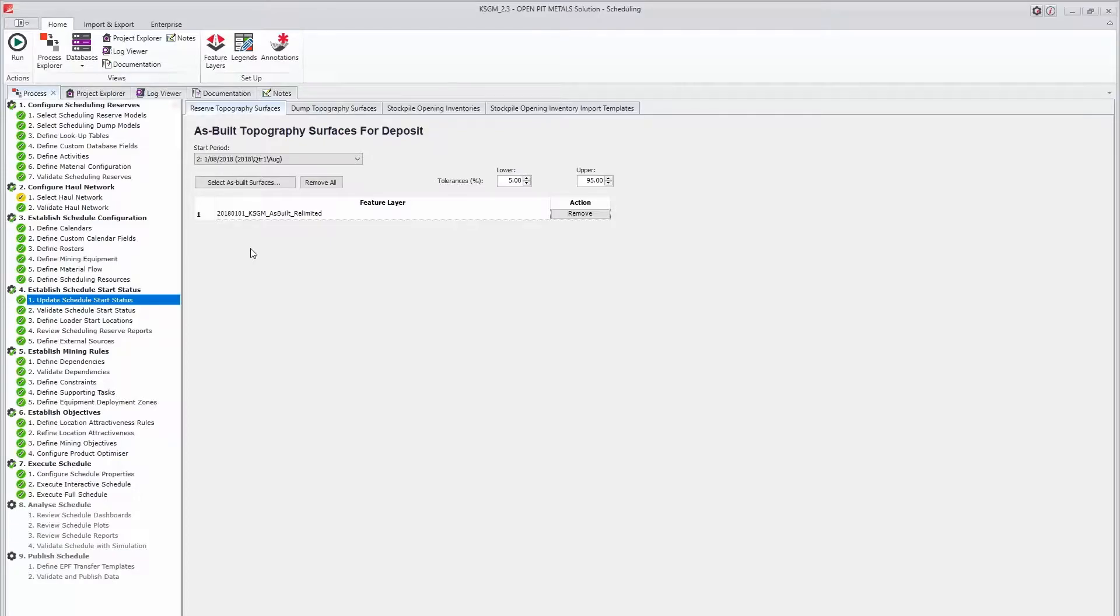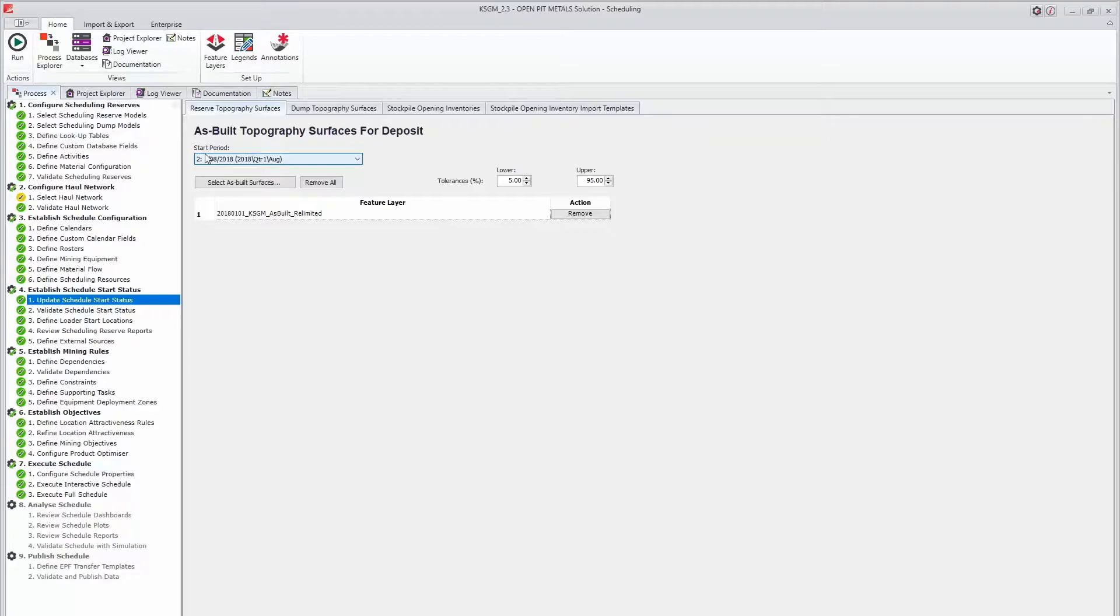To do this, we will use the Convert Output Path to Input Path tool. When using this tool, it's important to take note of the pre-scheduled start period. Here I have pre-scheduled out the first period, and scheduling begins in the second.